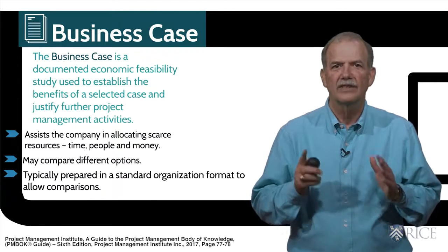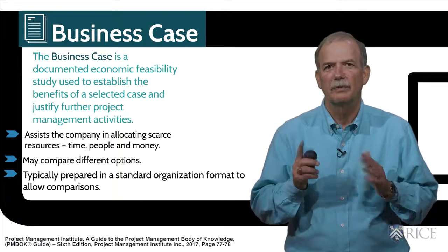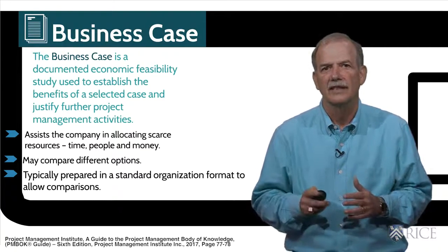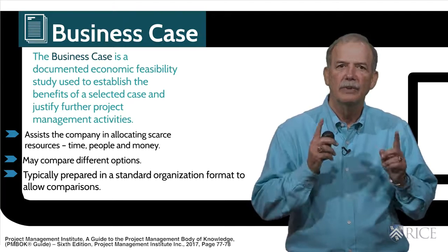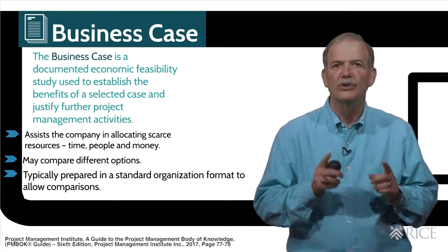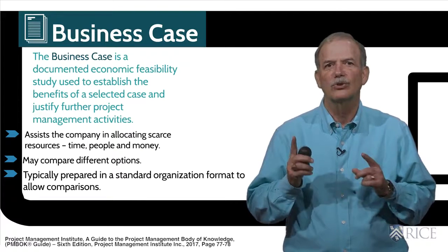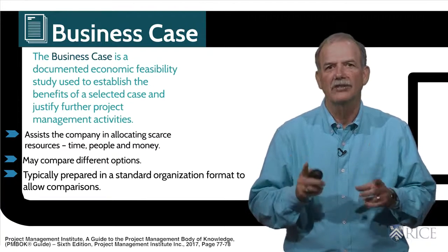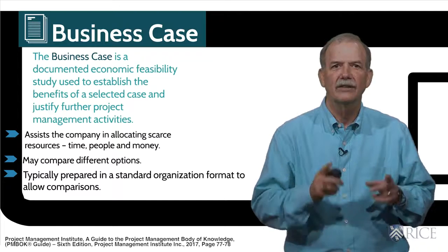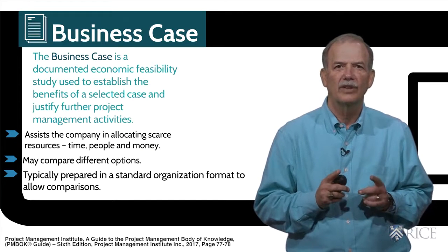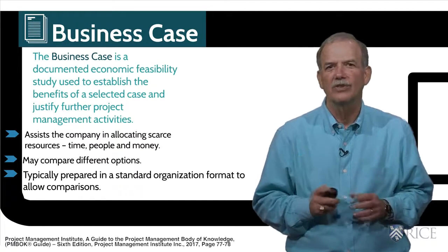Most organizations have a standard format and methodology for preparing and presenting the business case. As a project manager, you should become familiar with this approach and use it for your project. I've seen many projects get rejected solely on the basis that the project manager did not conform to the standard put forward by the organization, thus making the evaluation too difficult.